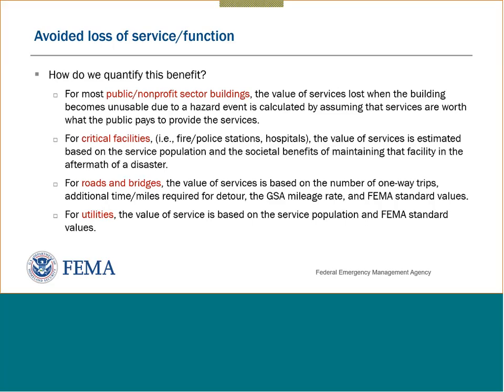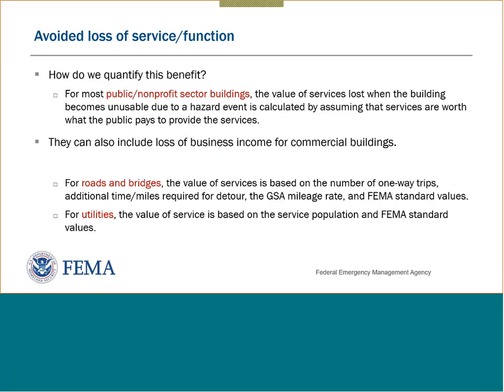And then for other buildings, public, nonprofit sector buildings or other facilities that aren't mentioned, we value the service by taking the budget of operating that facility for one year and dividing it by 365 to get a daily value of the service that's provided by that building or facility. Next slide, please.